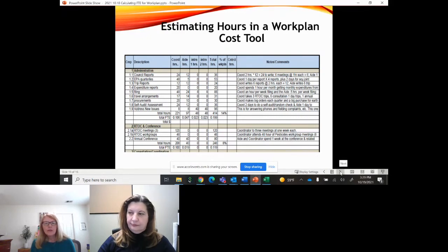The next thing I wanted to show you is estimating the cost at the component level. This is also showing you how you would input all of this across in a very, very simplified sheet. So you would come up with those hours you need to spend on updating your integrated solid waste management plan, and you've developed that using that prior sheet we just looked at. So you have 10 hours for the director and 100 hours for the technician. And then what else is going to go along with that?